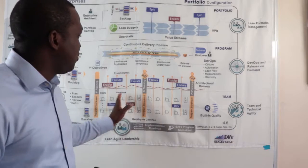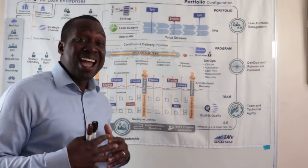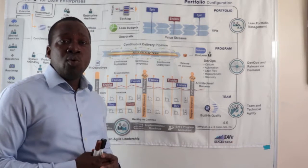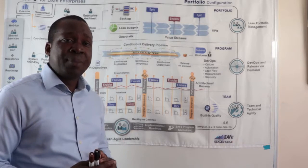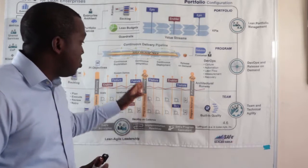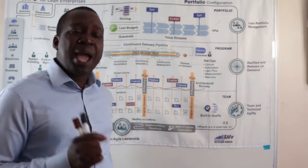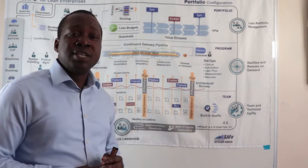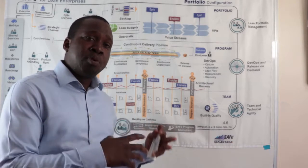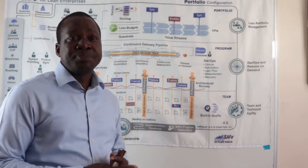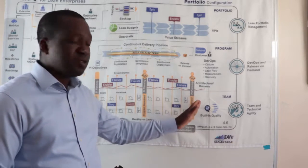At the end of each iteration, we've got a system demo. We're hoping that the teams are able to integrate their work and can demo what they've agreed to work on within that particular iteration. We've got our PI planning event which happens in the innovation and planning iteration. The innovation and planning iteration includes the program increment planning event. Once that is completed, we can go into another set of iterations.